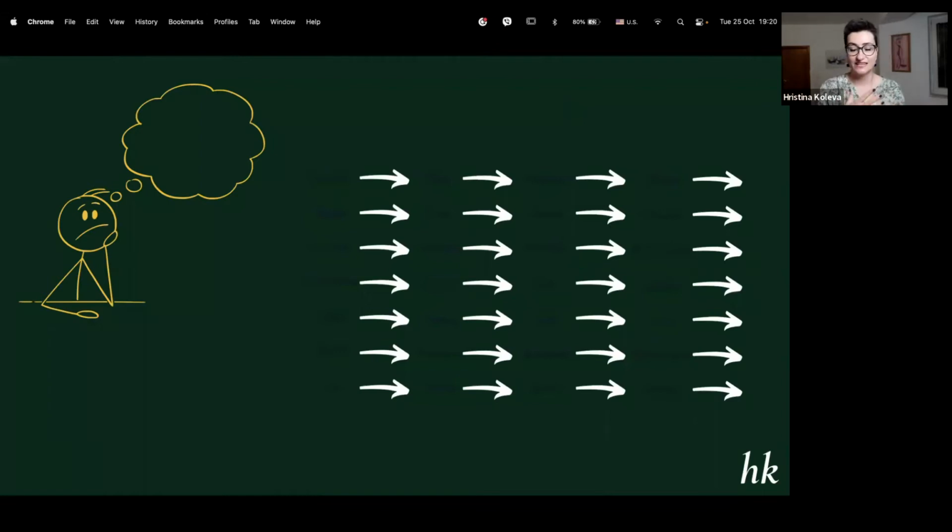It's relative. It's average. It's experience-based, but we can get some number of hours. It's usually 1, 2, 3 days, if we work non-stop, if we sit on our computers and we don't leave. But this is not the delivery time. This is not the release time.